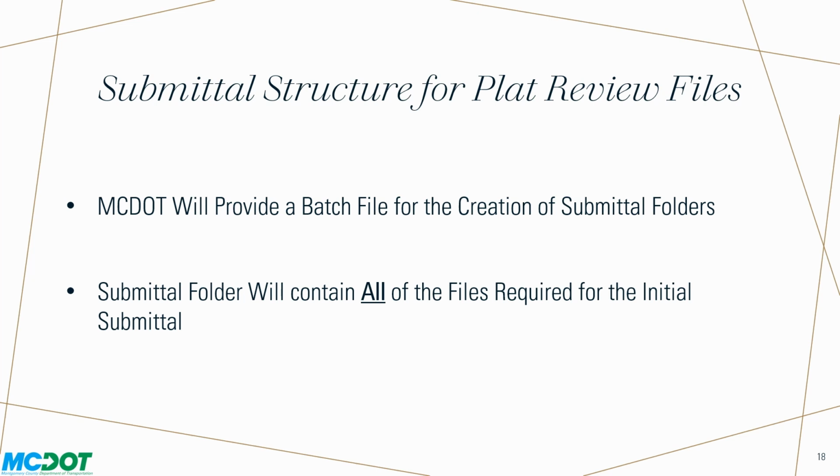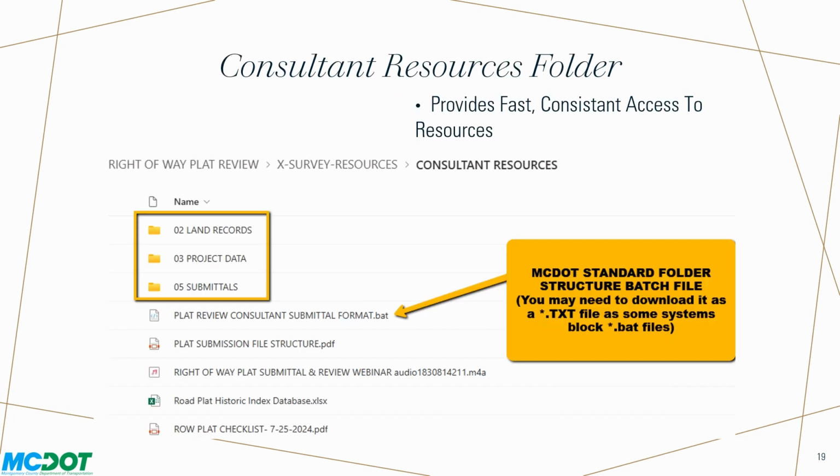We've provided an executable batch file that can be run to create the folder structure required for submittals. It allows for the easy organization and retrieval on our end of all project documents, along with definitive tracking of when things are submitted, especially with multiple resubmissions. The batch file is located in the Consultant Resources folder found in the County SharePoint site. The consultant personnel who have a county email address will have read-only access to the Consultant Resources folder.